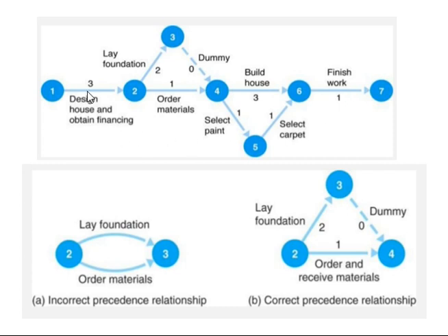The activity name and the time duration consumed by that part of the project will be highlighted exactly at the center of the arrow mark, and that activity has a start point called 1 and an end point called 2.